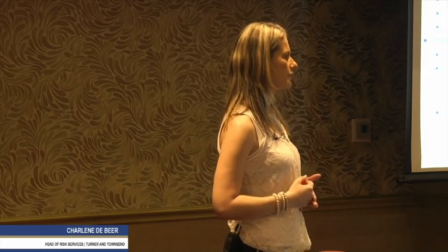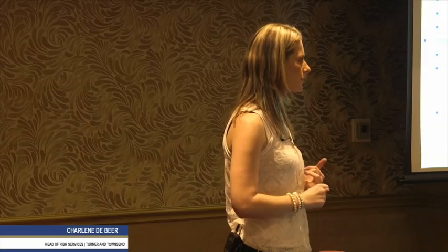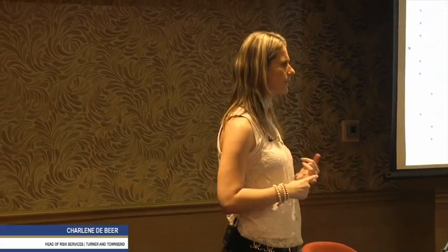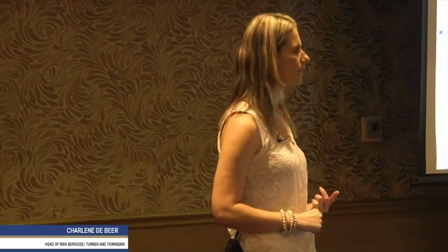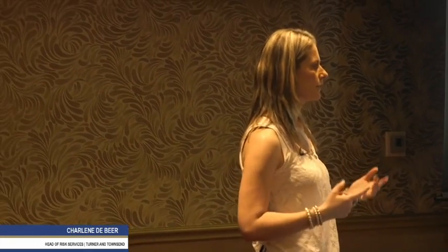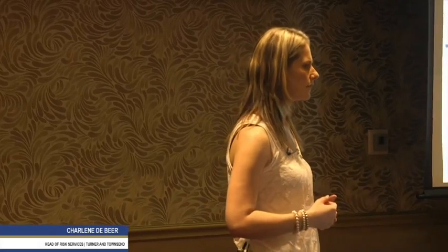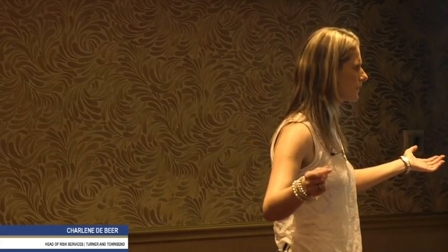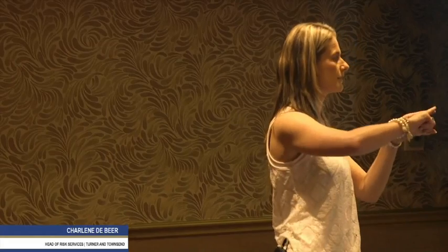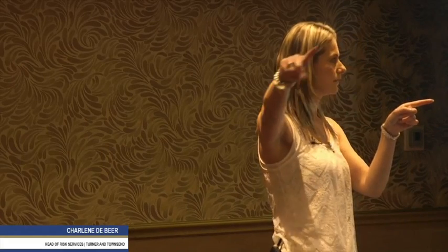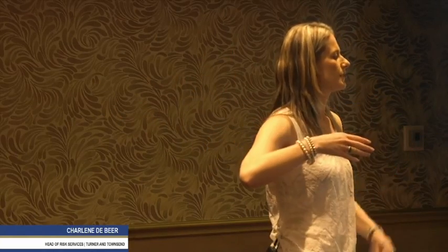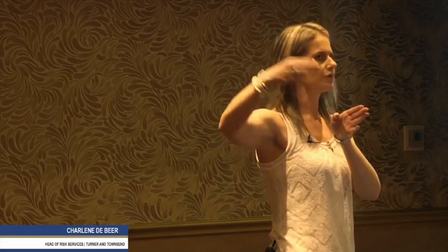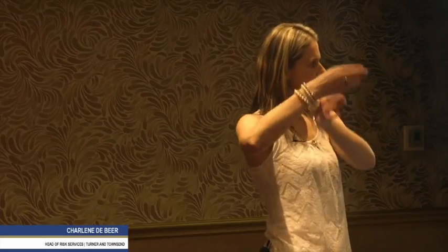And then you can look at mitigations, like what's the productivity percentage we've assigned to the schedule? 90%. Okay, Mr. Contractor, I've never worked on a site with 90% productivity, so it's inaccurate. Then I'll go back and say drop it to whatever the trend says, that you've never been more than 60% productive on the site, so you drop your schedule to 60%, because then the date would run automatically, right? Their schedule will slip then if they start building those things in, the accurate ones from their side, and then do a risk-loaded schedule. Then the overrun won't attach to the end date, it will just put it in where it's supposed to be.